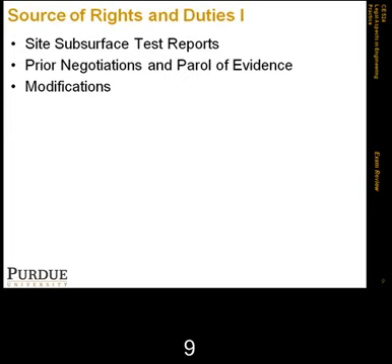And there we also talked about something called the pre-existing duty rule, which says that the contractor, for example, cannot get a price increase without giving something in return. So if they went into contract for building a two-story building for $100,000, they can't claim $110,000 without offering something extra to that building.